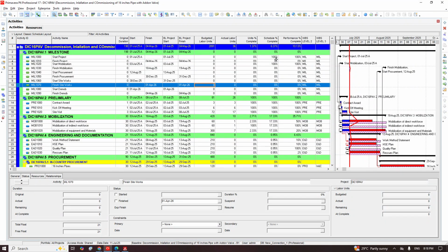So now what this implies is that as much as this particular schedule and performance are updating, if it has not gotten to a significant figure whereby the unit percentage will record 0 point something, it won't show. Most often you don't even record 0 point; it starts from 1. So if it's not up to 1, the unit percent will not come out. You will only see 0 here. But how do we know if it's up to 1 or not?